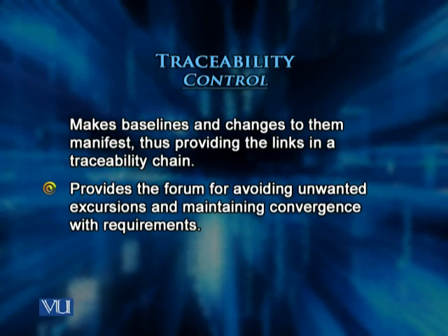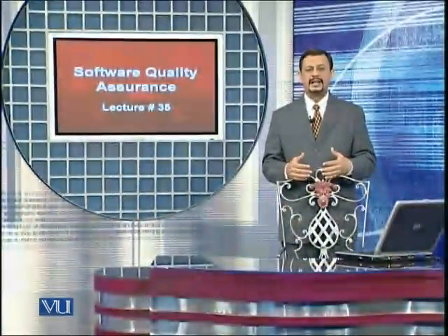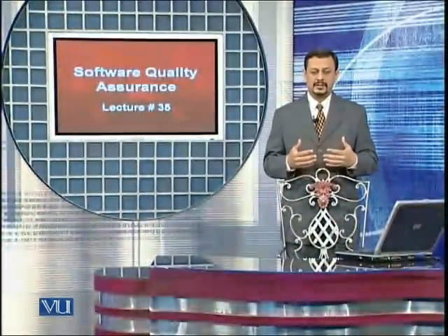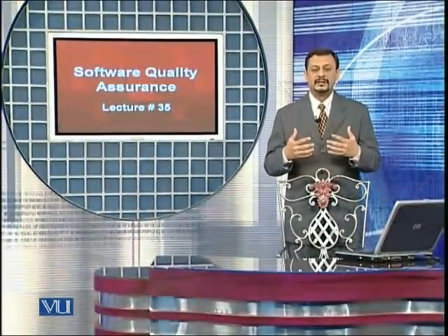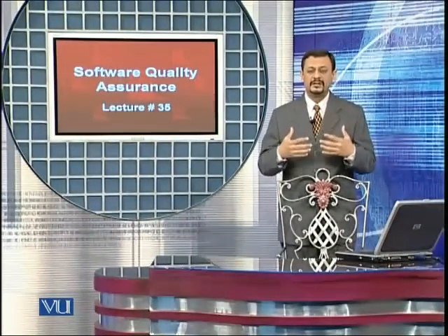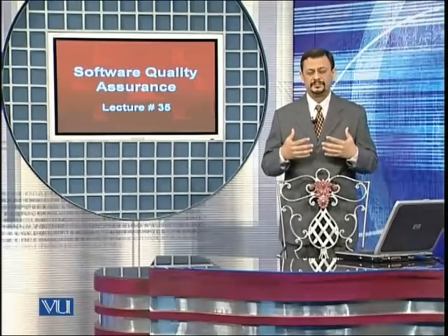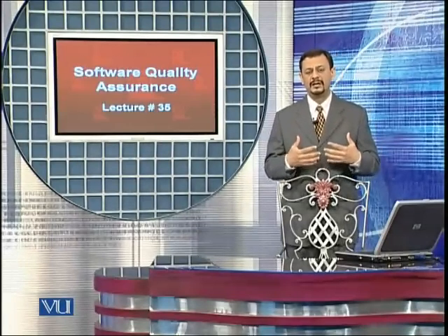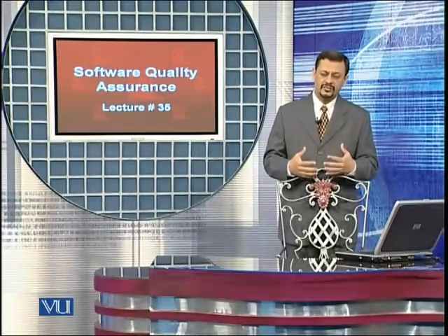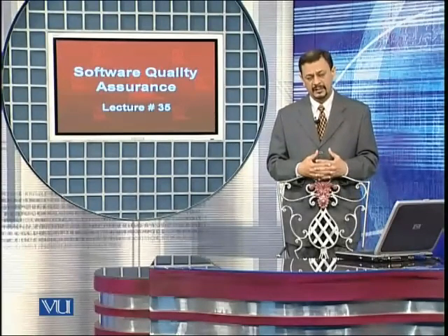So with changes being assessed, we cannot allow those changes that do not implement software requirements, the requirements that have been agreed upon earlier by the customer as well as the developer.